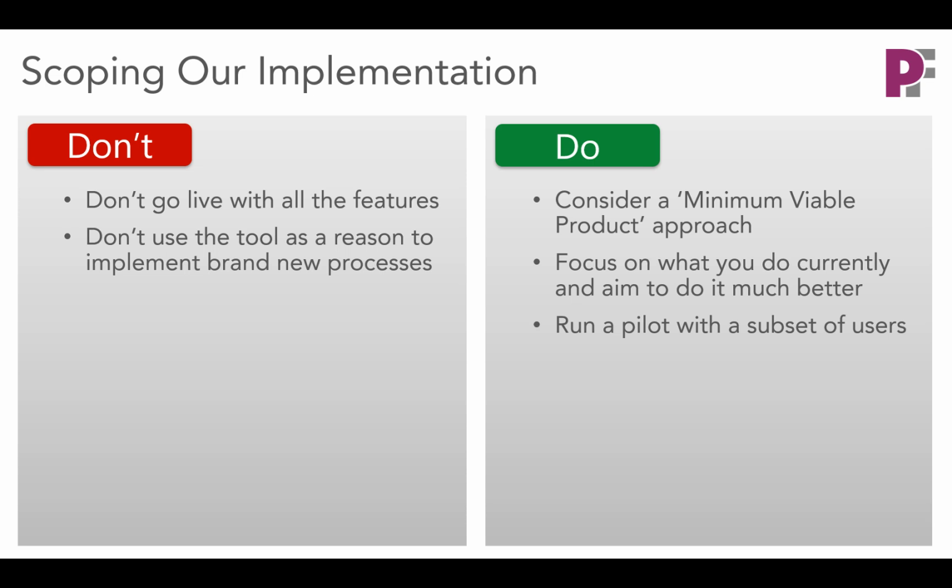Another key recommendation is, of course, to go live with a pilot that is just deployed to a subset of users, and of course learn from that. Apply some improvements, apply your learnings to then roll the tool out to further users over time. And with that, it's very important to not spend all your money by the time you've gone live. Keep budgets for future phases, because once the tool is up and running, you will want to make changes based on what you've learned, based on the real world experience of operating the tool.